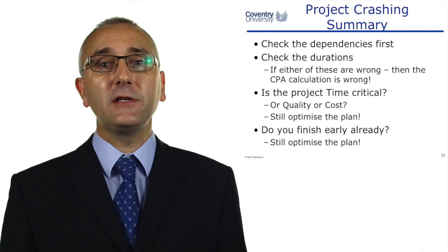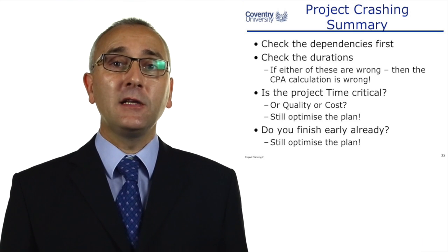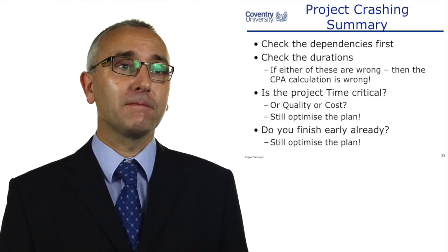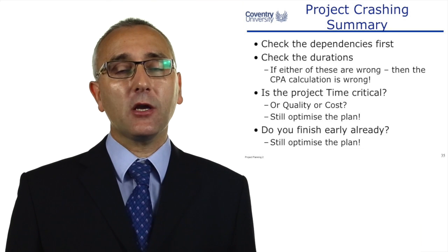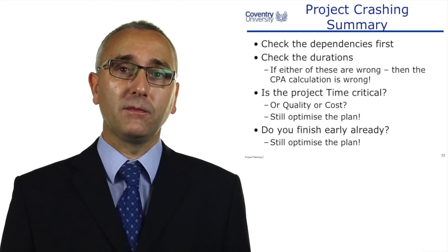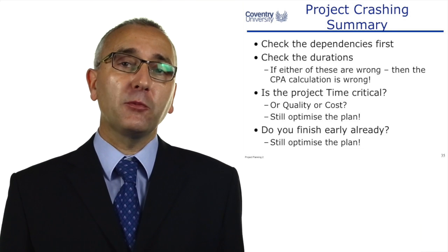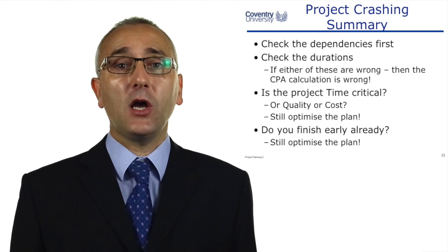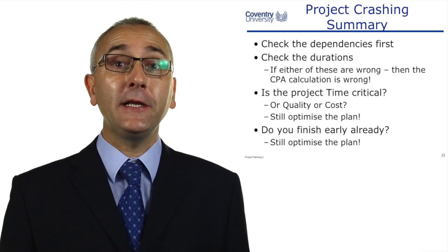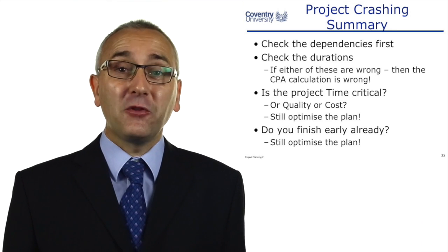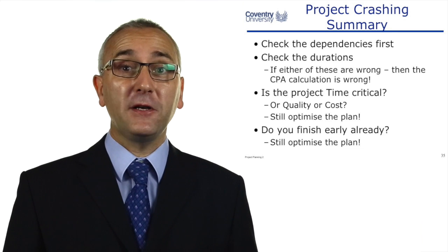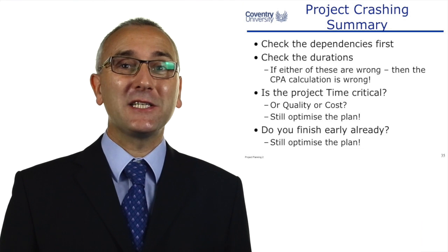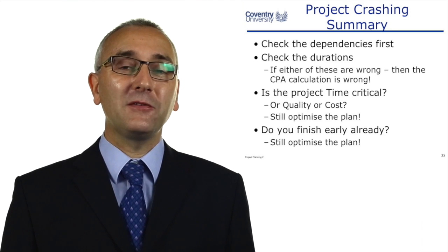Check you've got the best dependencies — if our dependencies are incorrect, then the total time for the project that we've calculated will be incorrect. Understand: is the project time critical, cost critical, or quality critical? Still optimize the plan if the project is cost critical. If the project is time critical and you're already finishing early, still optimize the plan — there could be a bonus for finishing early. You want to be working to the best plan that there is.